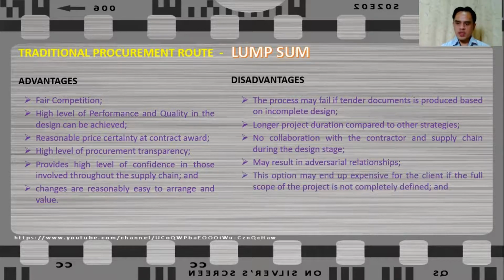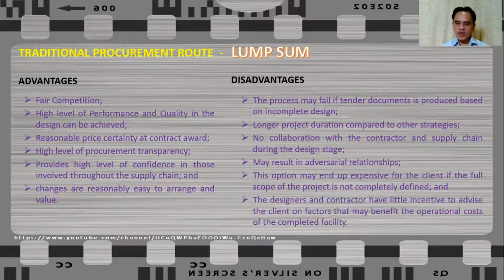This option may end up expensive for the client if the full scope of the project is not completely defined and could result in the client paying high-risk premium, and provides no incentive for the designers and contractors for their advice on factors that may benefit the operational cost of the completed facility.